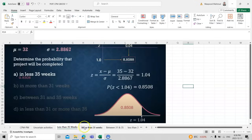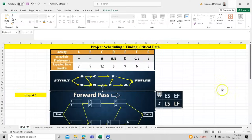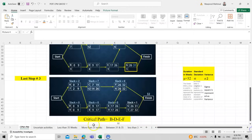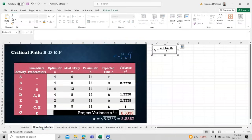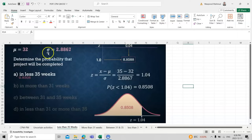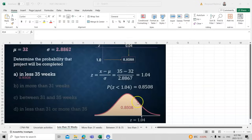From our earlier critical path analysis, the expected project duration mu is 32 weeks and the standard deviation sigma is 2.8867. To find probabilities, we compute the z-score using the formula z = (x − mu) / sigma.